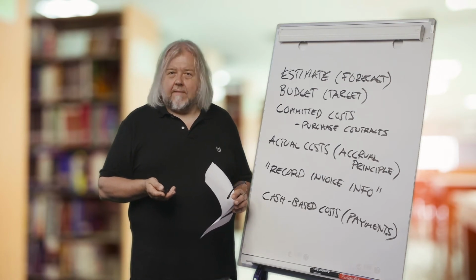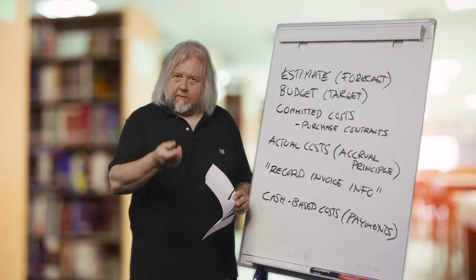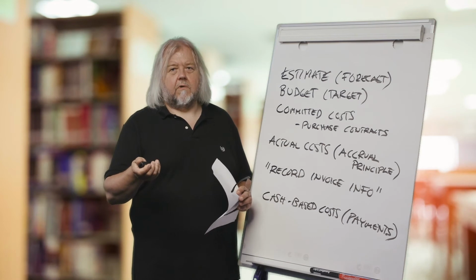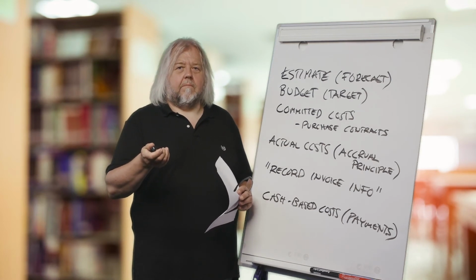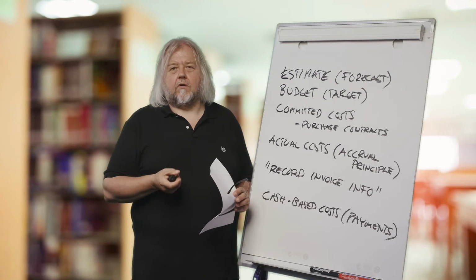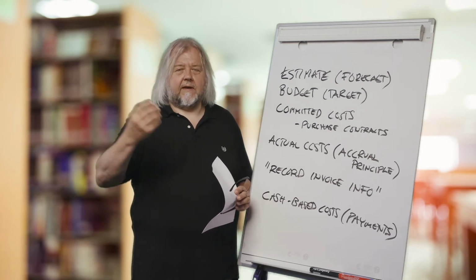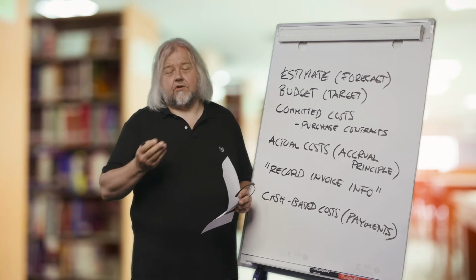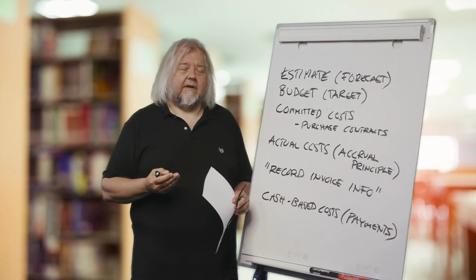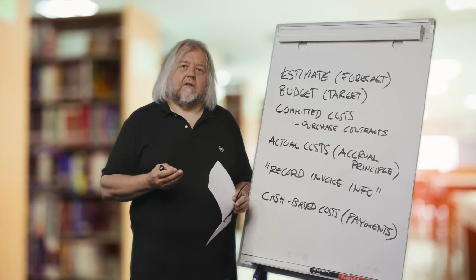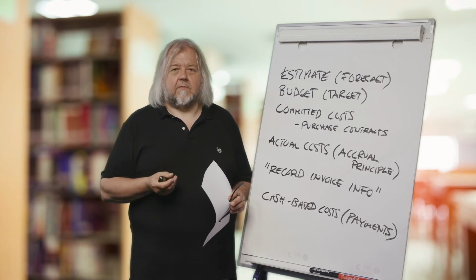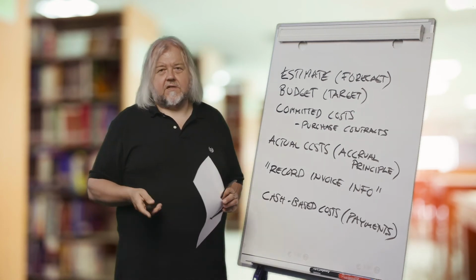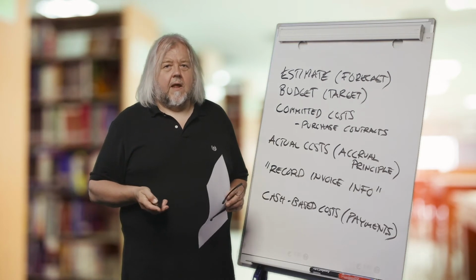It is an aim of any project that if we are a project supplier firm, we don't finance the customer. So we don't pour in more money, more costs, than what we can get from the customer, and the customer shouldn't finance us. So these revenues and costs should be rather much in balance, and the terms of payments with the customer should be planned in a way that the customer doesn't finance us or we don't finance the customer.